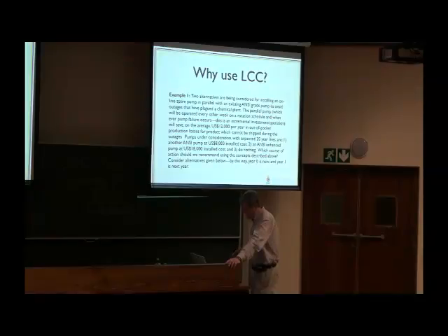The pumps under consideration all have an expected 20-year life. One is another ANSI pump at $8,000 installed cost. That's the one option. The second is an ANSI enhanced pump at $18,000 in installed pump cost. And the third one is just to leave the present pump situation as it is. So either a similar pump, a copy pump, or an advanced pump, or not.